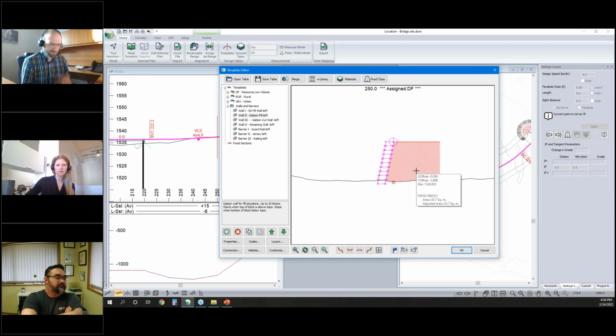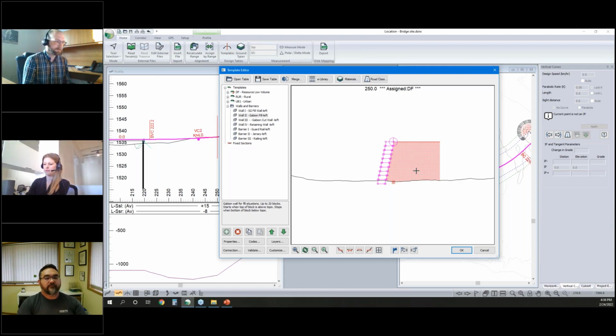So for example, I mentioned designing a tote road. Well, if your road's climbing and you want to have a lock block wall attached to it, maybe you want the toe of that set at a set elevation. So you may design the tote road first and use that as your bench to build up off of. So absolutely yes, and there's lots of other tools to deal with that as well.